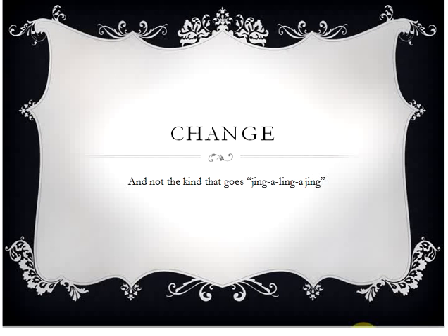This sets a particular expectation. End users can prepare. They know I work on Tuesday, I'm coming to work Tuesday, there might be a change. It reminds them, oh, today's Tuesday, that's right, this change was coming today. It helps you as the IT analyst be able to control some things. If the change goes badly or poorly, you generally have days of the week where some service support person, potentially from the vendor or another support site, may be more likely to be available. If you do a 5 o'clock on Friday, you're probably the only one in the IT department working at 5 o'clock on Friday, and you will have no help if the change goes poorly.